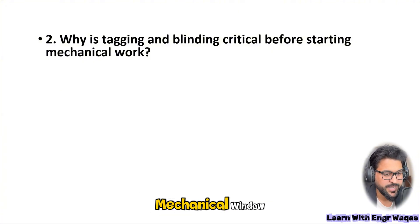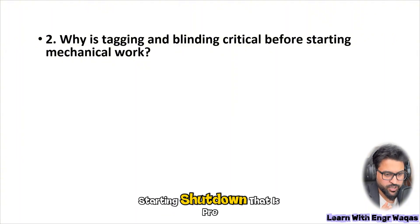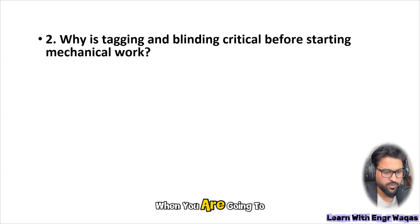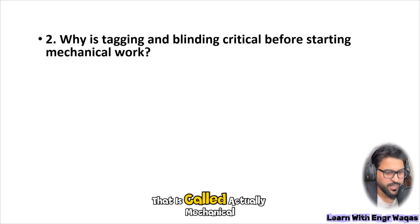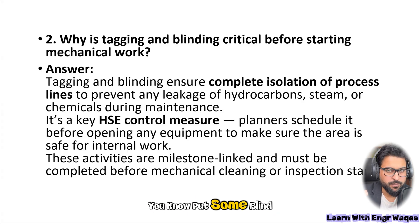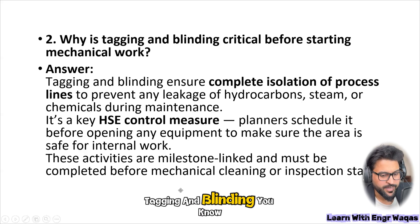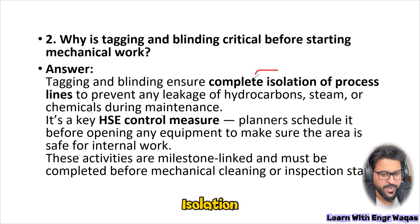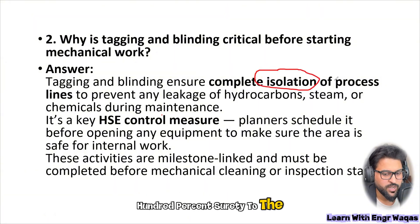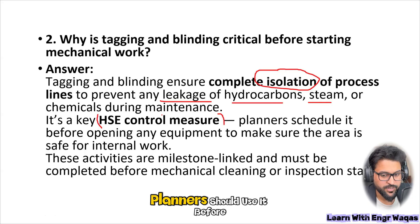The next question is: why is tagging and blinding critical before starting mechanical work? The mechanical window is where you start your maintenance work — that period between pre-shutdown and post-shutdown when equipment is opened. Blinding means placing a blind flange on the end of piping at equipment outlet and inlet slides. Tagging and blinding ensure complete isolation, which is 100% surety for process safety. It prevents leakage of hydrocarbons, steam, or chemicals during maintenance — it is a key HSE control. Planners schedule it before opening any equipment to make sure the area is safe.